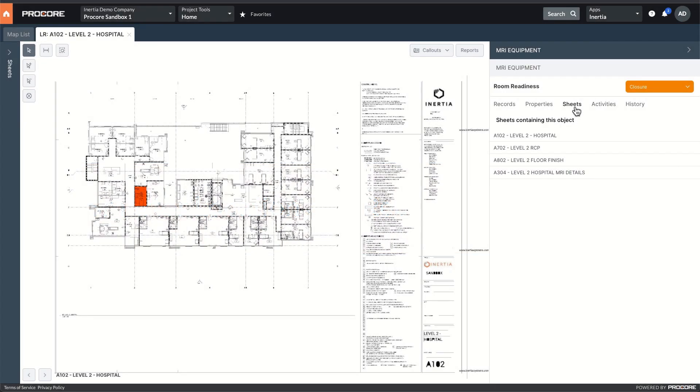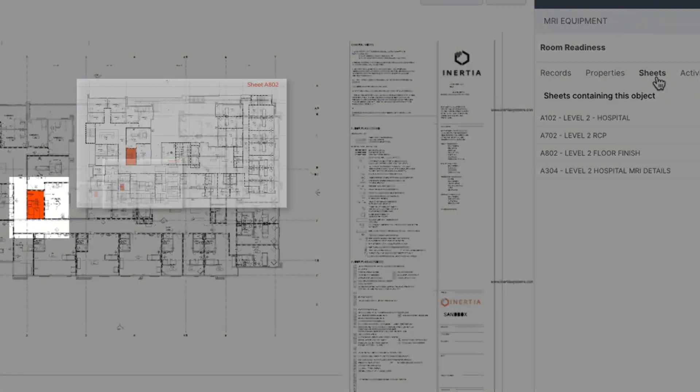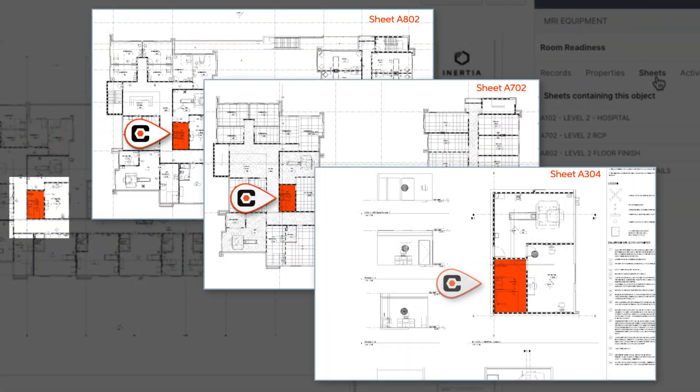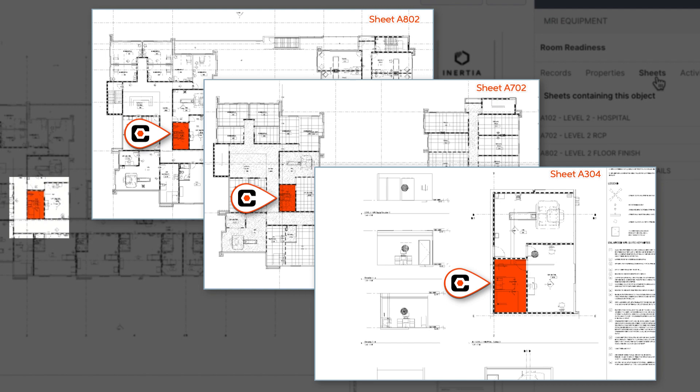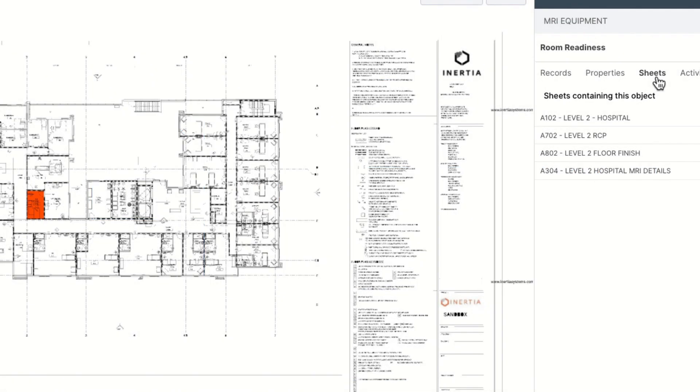Because records are attached to ICD objects and not marks on a PDF, everywhere else in the set of drawings where that object appears, you have complete access to all of the activity.